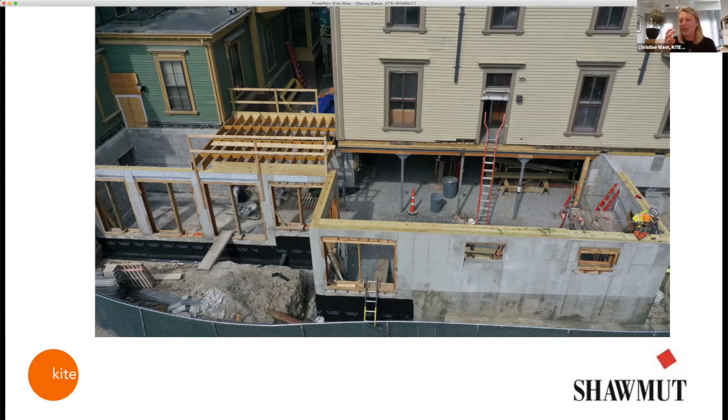And the team was like, well, can we take that money for something else now? Like, can we do it? It was like, nope, we're not connected. And sure enough, we found that the roof over Peter Green was basically full of water. There's three layers deep and it was saturated and it was about to come down. So we were able to use the money to pull it off, and it wasn't an upset to the budget because we knew something was going to go wrong. So it's kind of a good approach.